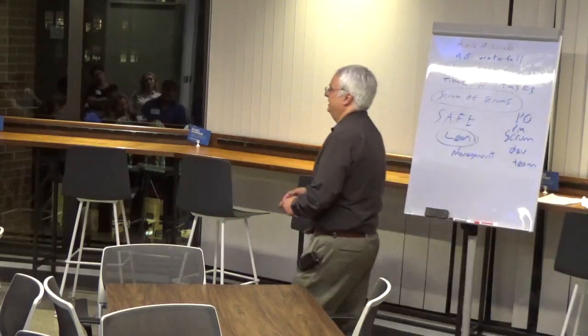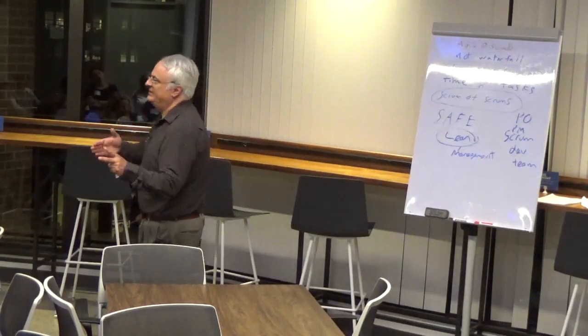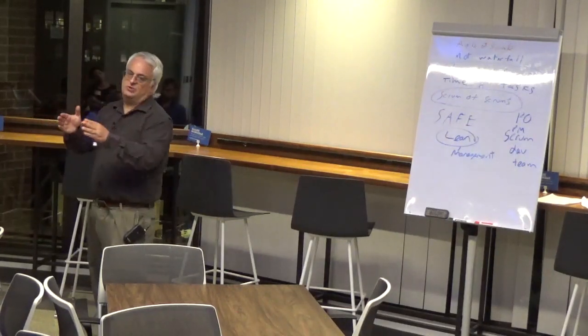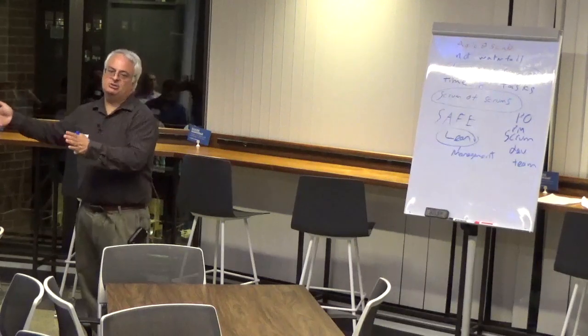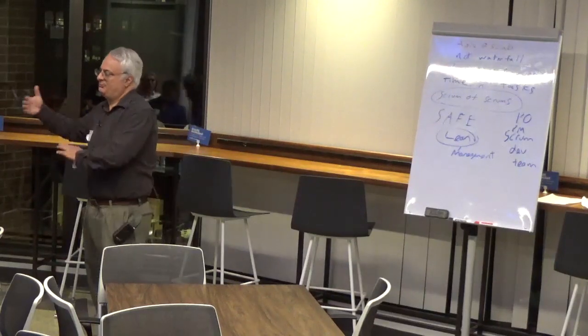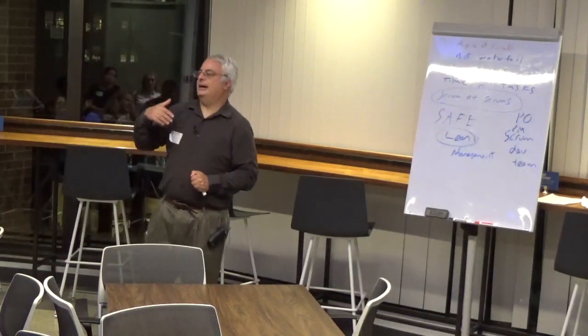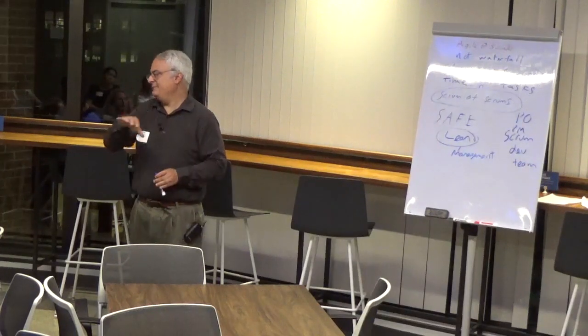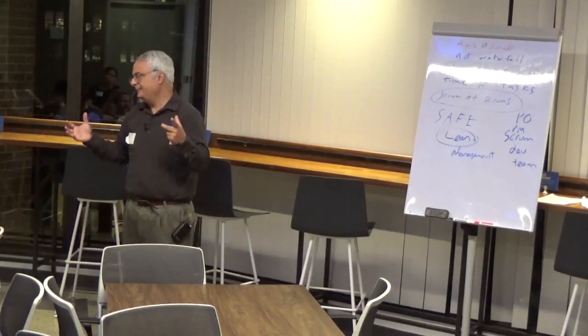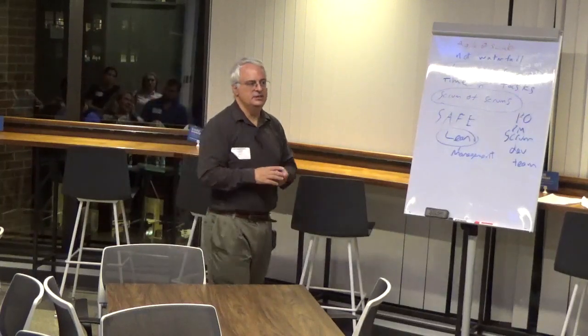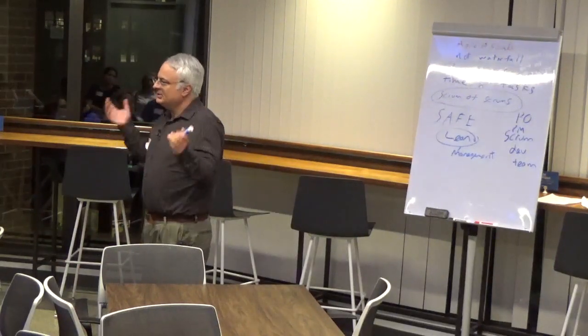In the heavily regulated industries, in something like Scrum, I tend to see an extra sprint at the end of each before release, where they're doing testing and fixes and everything else and patching, because they have to get it right and get it fixed. So they'll add the quote buffer time in at the end to make sure we test it. Now, you're supposed to be testing the whole time, of course, but there's always some integration problems, some other problems that come up. So if you're releasing a product, and it's not just in the cloud all the time, but something like a physical product, many times you have the testing added in. Some people who are Scrum strict people sort of go, well, that's not right.